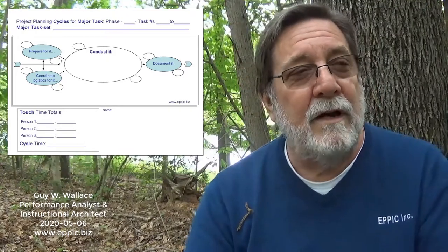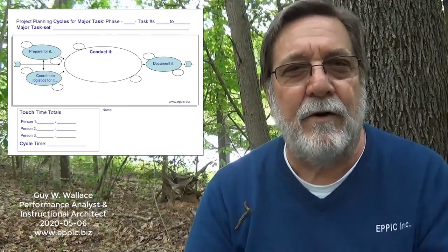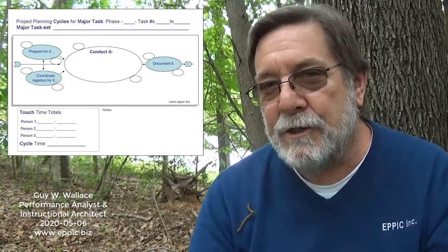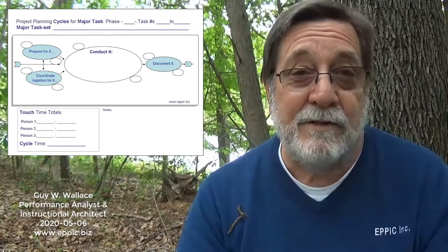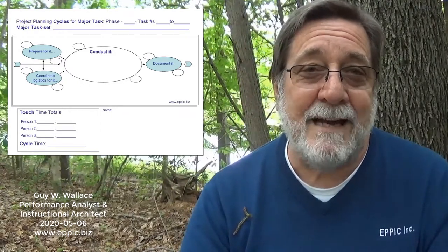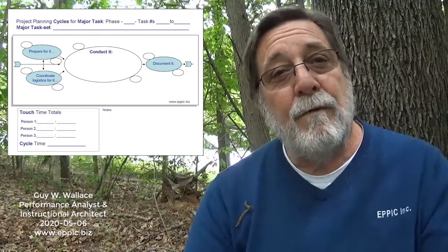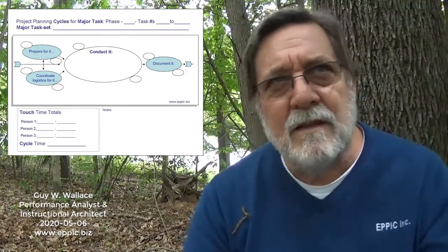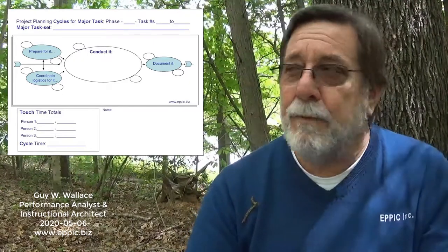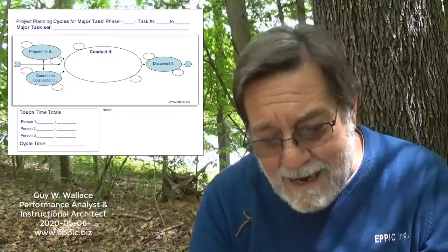But so this was important, and I did a video of my 2009 ISPI presentation on this. I'm not sure it's a very good video, but it goes through examples of how I can take my standard six-phase approach and break it down into exactly how many of these bubble sets there would be, because I've already figured all that out. If I know that I'm going to have four types of analysis for my analysis phase, well, I've got four of those bubbles, one to do the target audience analysis, another one to do the performance analysis, although the knowledge and skill analysis is done within that, so I can combine those two. And then there's assessing the existing training, which is another one. Then there's preparing for and conducting the project steering team gate review meeting, and then boom, we're into the next phase. But anyway, so that's how this works.